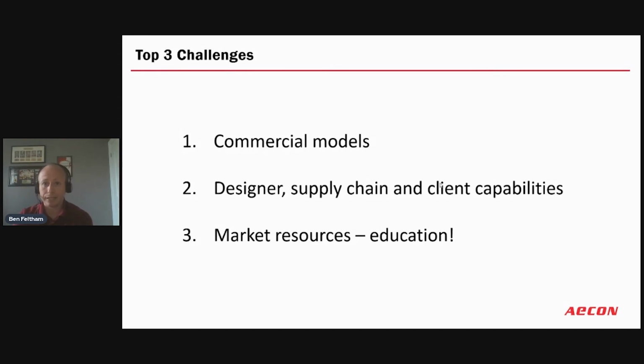Coming from the UK, they had the NEC4 commercial model, which allowed for early warnings and early risk management and piece like that. And BIM really supported that process before I left, and I saw that happening here. It's very much, we got a problem, let's write a letter and let's see you in court type approach.